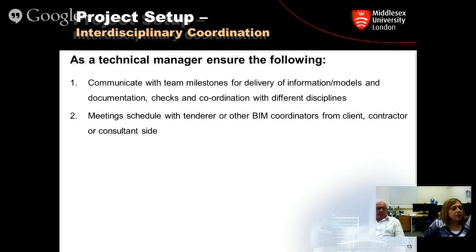Okay. Second thing, there should be meetings scheduled with other parties, with the tenderers, the client, the contractor, the consultant. So not just internally, externally as well, to make sure that everybody is in alignment and in agreement with what's in the BEP, okay? For all you know, the BEP might not have been created with the agreement of everybody on board, so everybody should be in alignment with that.